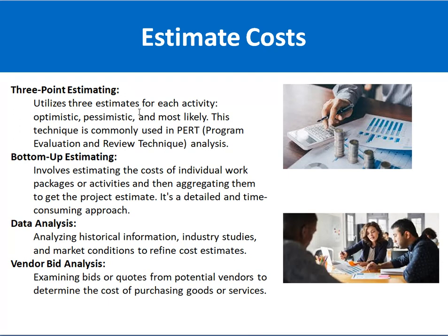Next is the bottom up estimation. Bottom up estimation means that you divide the whole project into smaller chunks, smaller tasks, and from the bottom you calculate the estimation. From the bottom to the top level it aggregates into the project estimate. So that is basically the concept of bottom up estimation.